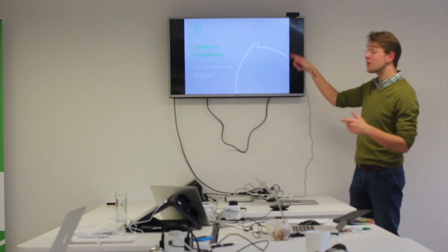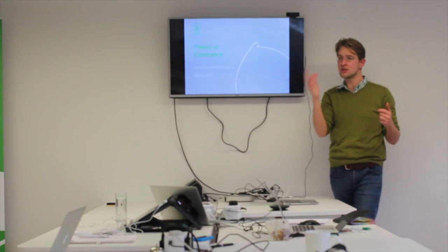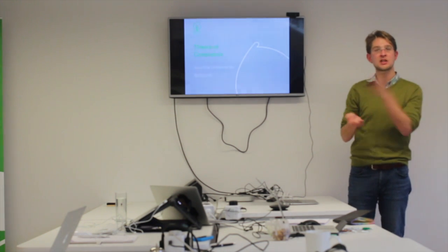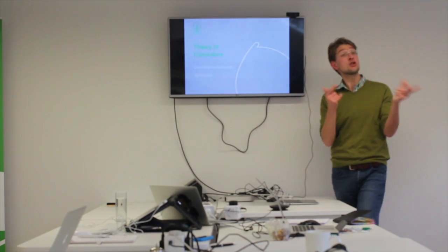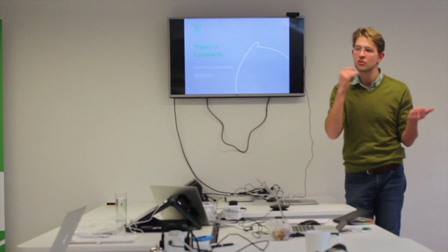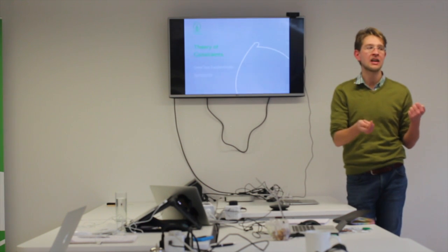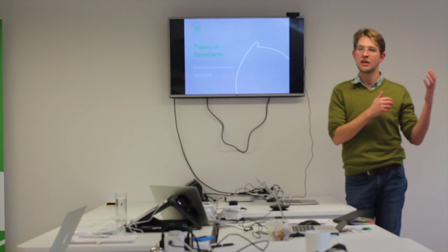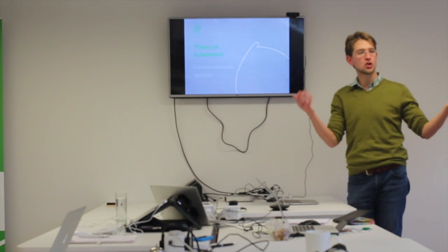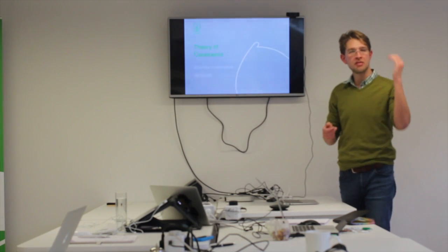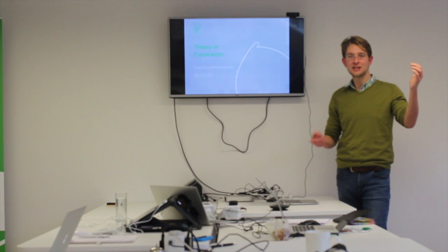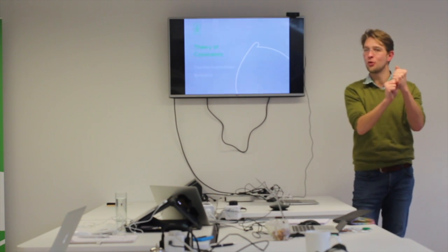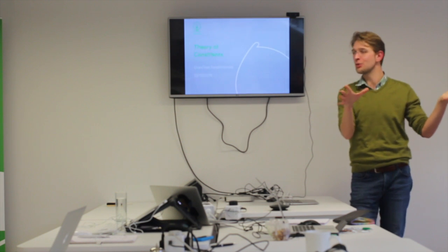This is where the throughput accounting starts to come in, where you start to say, actually, for the amount that we've outlaid, how much are we able to service from end to end? Because one of the crucial things about throughput accounting is it recognizes that work has no value to you until the point at which you invoice. So in the jargon of theory of constraints, that's the date of sale: the date on which a thing that the client actually has to pay for is sent out into the world.